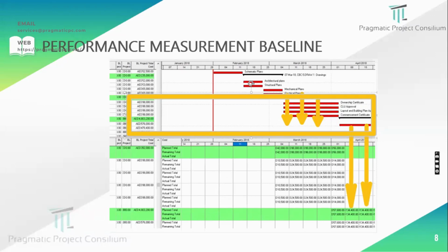Here, based on the approved method statements, the activity has been distributed, and we know the plan, how the resource needs to be allocated to the activities, and it has been allocated to the respective activities. But now in our case, this is converted into AED, and therefore we have given the cost part. All the resources, manpower, material, and equipment, are converted in terms of money.